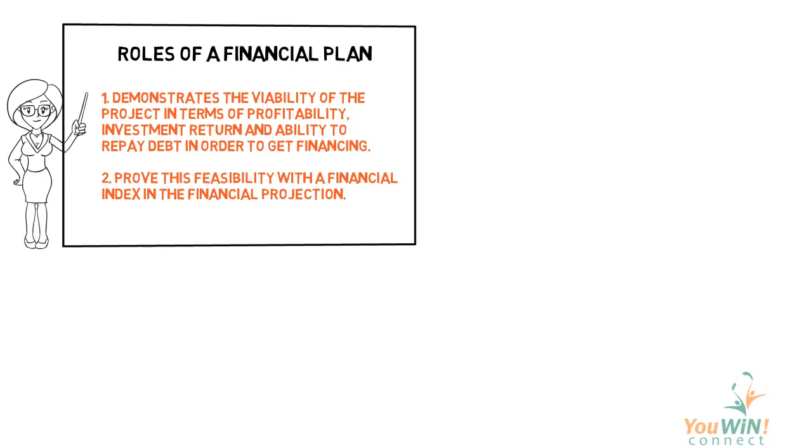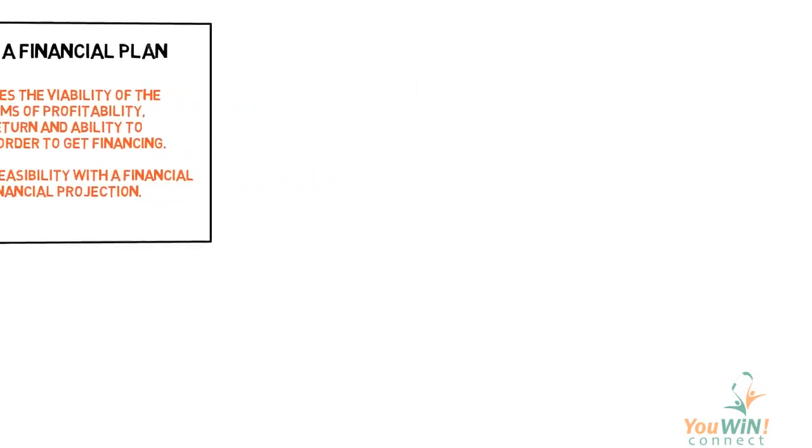When we put investment ideas into practical figures, setting the expected receipts and expenses of the project is one of the things that shows that those projects are viable. The simplest way to control project implementation is to make a comparison of real revenues or expenses and forecasted revenues and expenses in the financial projections.